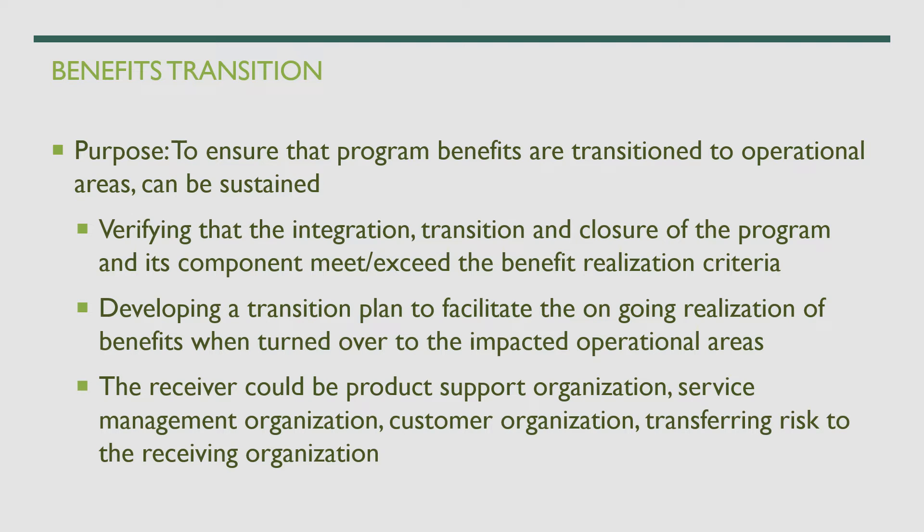The receiver could be a product support organization, service management organization, support organization, or customer organization. You will also transfer risk to the receiving organization. As a program manager, you need to ensure that any risks not fully mitigated but still relevant to the program are transferred to the receiving organization. When transitioning to operations, you must hand over correctly and inform them of those risks.